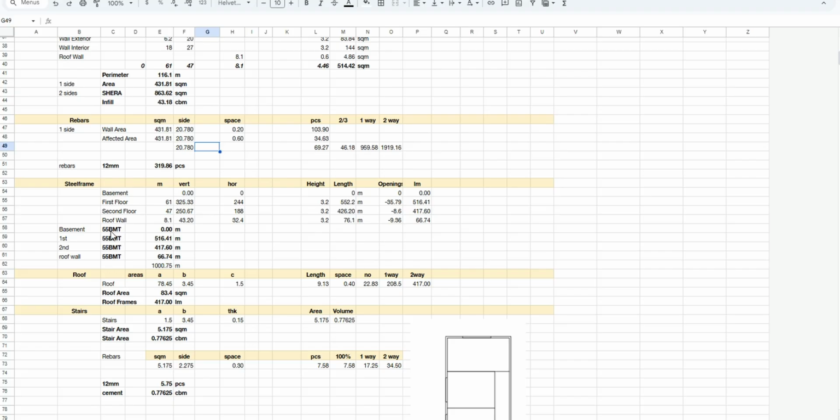For example, we have the base metal thickness of the basement until the roof. Here is the linear meter. And I will get the height length minus the openings or the doors and windows. So this is very technical. I made this during the pandemic to have my own formula. I did not rely on other people's formulas because I know the principle of the basic math. Okay, so I have the square root as well.